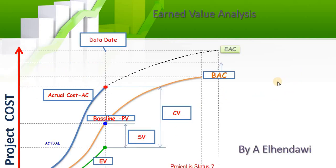Here is a summary of earned value — it is very easy. I have plotted three curves: the blue one is the actual cost, with a projection going forward to the estimate at complete; the second line is your baseline, which is the planned value; and the last one is the earned value. You can see that on this project the actual is higher than the planned and also higher than the earned value. The SCV is the difference between planned and earned, and the CV is the difference between actual cost and earned. At the end you can also see the estimate at complete and the budget at complete, which comes from the baseline.